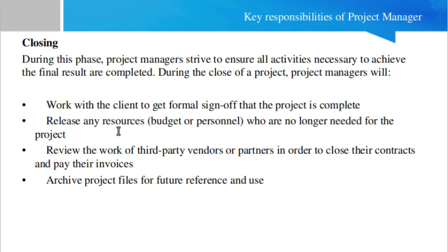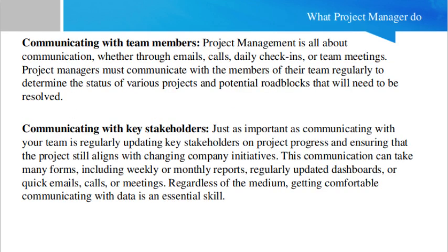In the closing phase, you have to work with the client to get formal sign off from the customer that the project is completed, release the resources, review the work of third party vendors, and close any procurement, if there is any. Archive project files for future reference, and do the lessons learned documents, that what things went wrong, what things went right. So, you have to take all those things in the closing phase. This is the responsibility of a project manager.